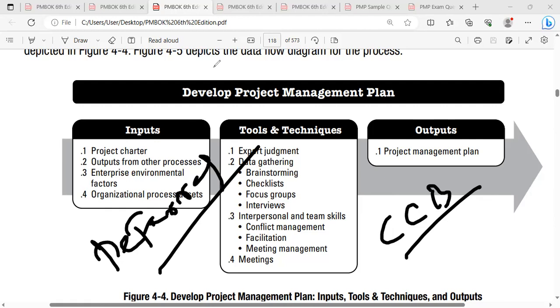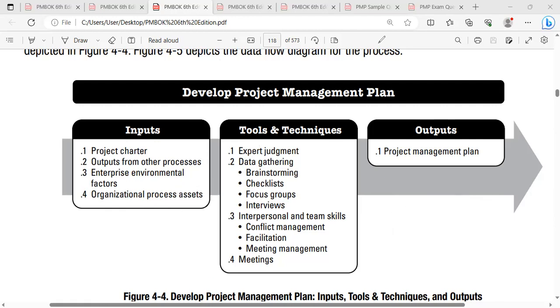Okay. Now, you are a requester. You want to do some course correction. You want to add some scope because the client, with a high-level discussion, is asking you to add the scope, and you're saying that, okay, added scope should come with added time scale. Added time scale should come with added resources. So the budget will also be added. So everything is approved. The contract price is revised. Everything is approved. Everything is good, fine.